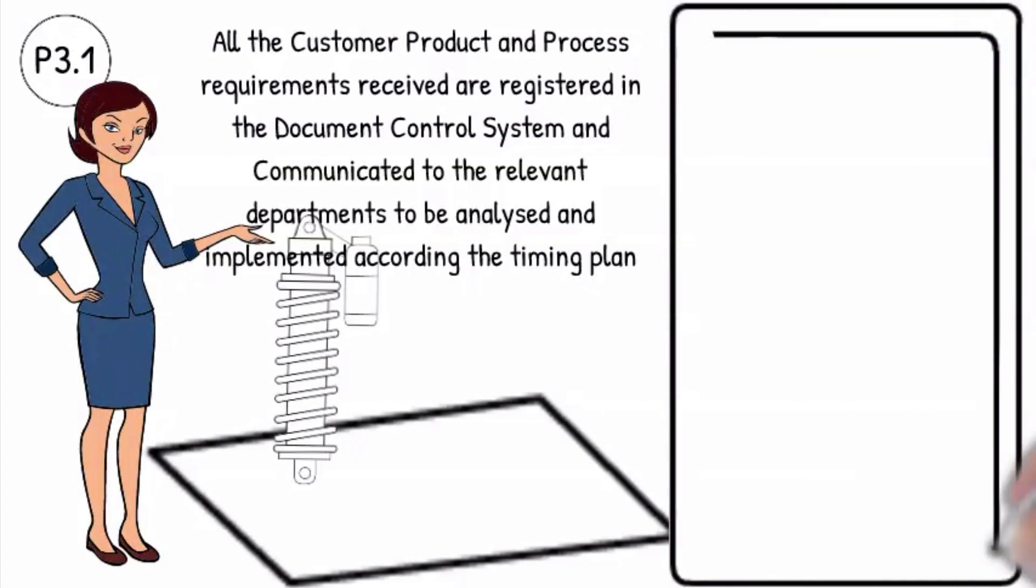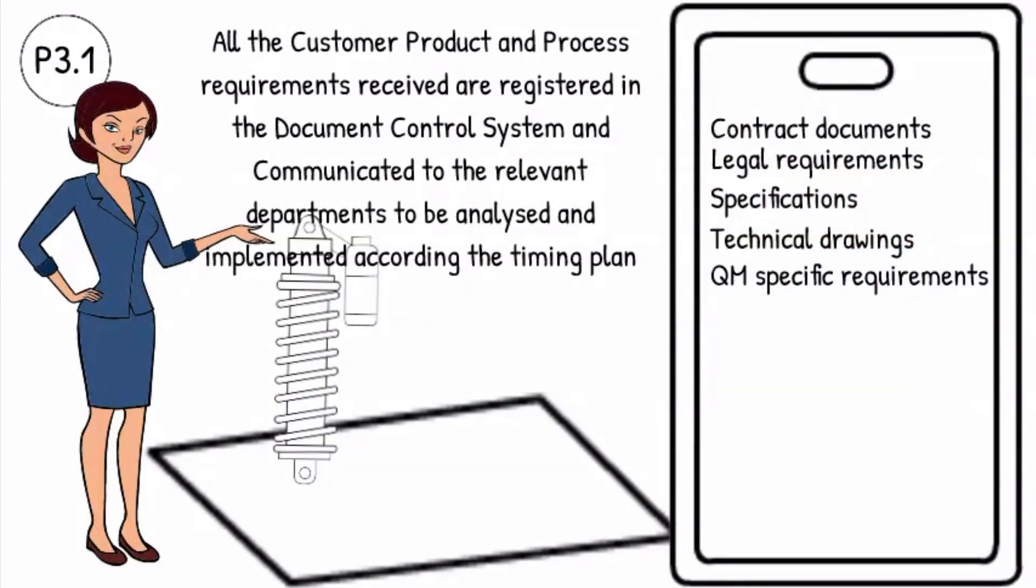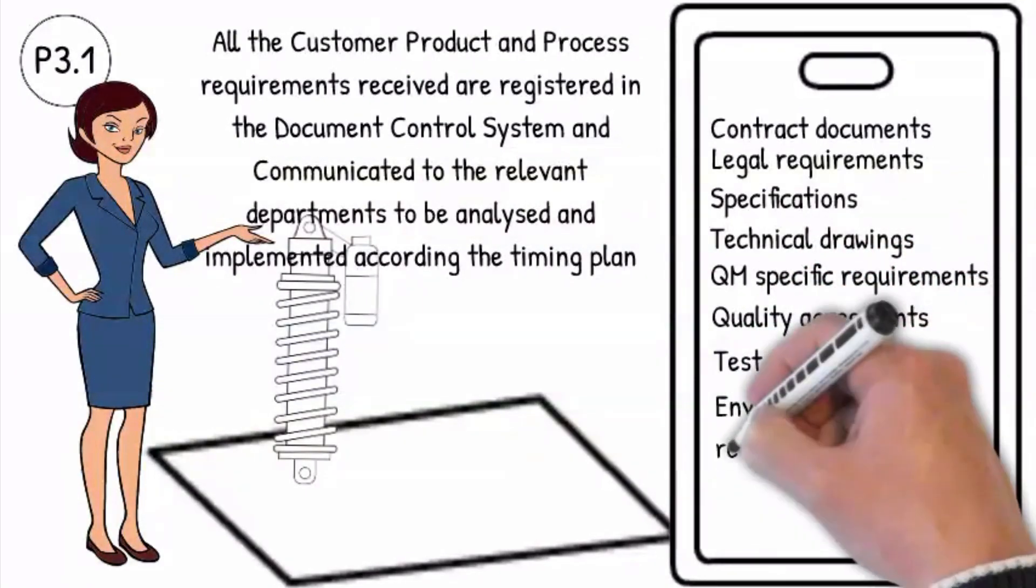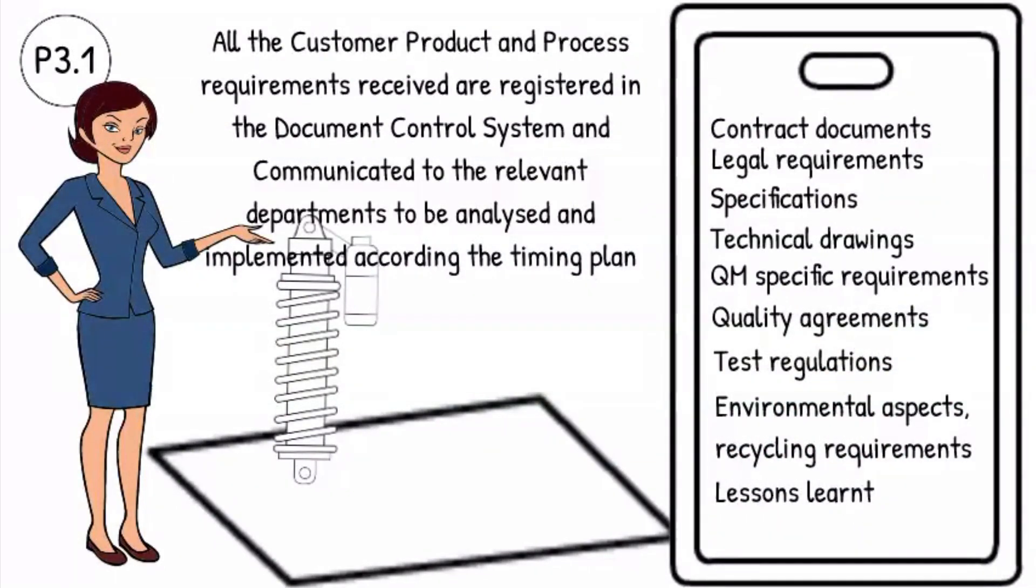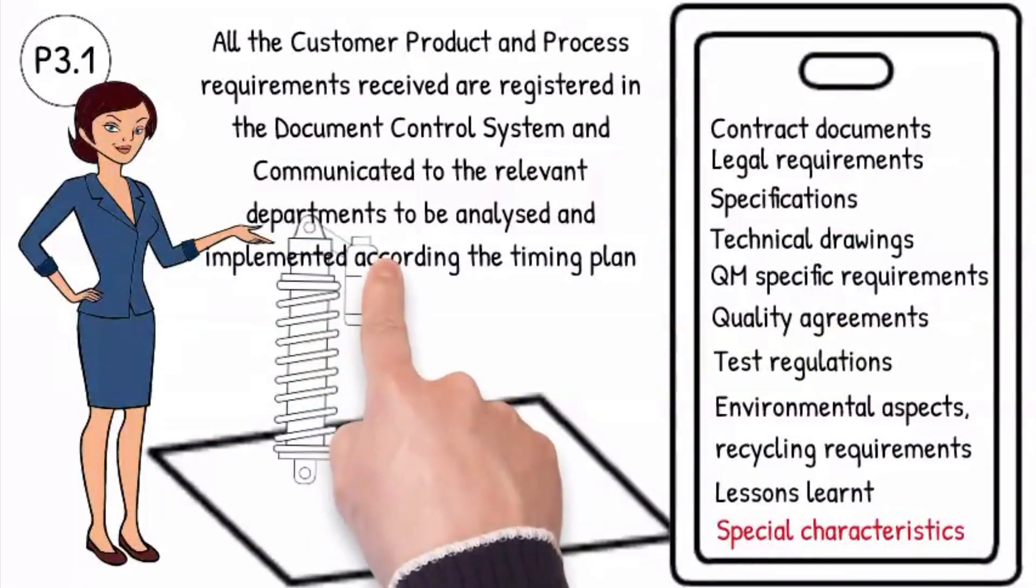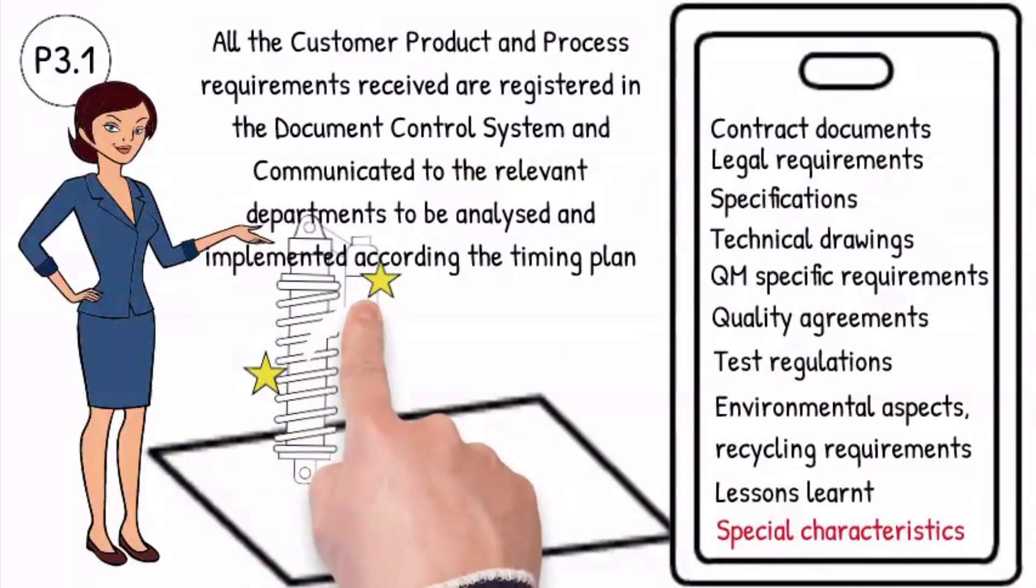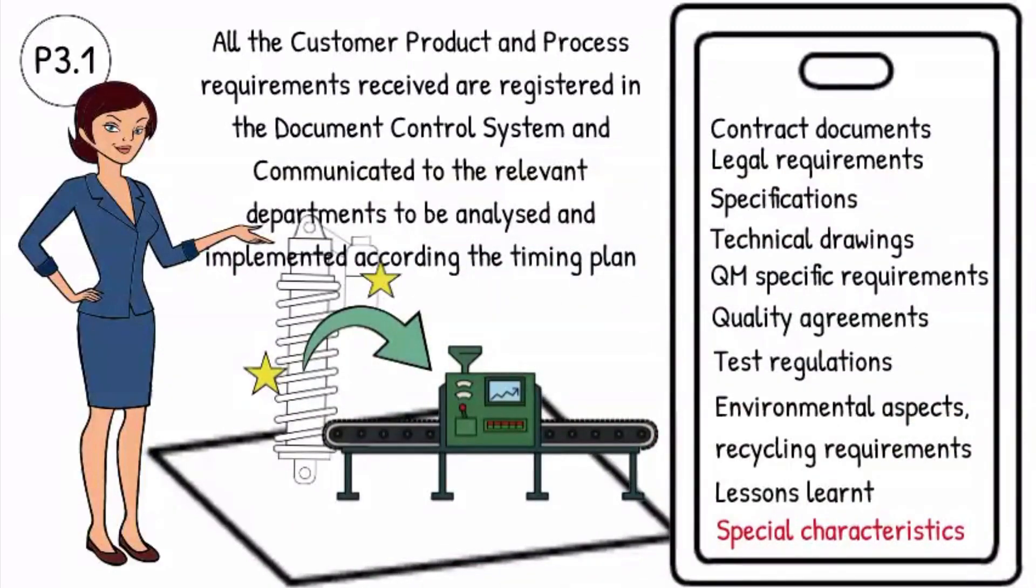And include the following: contract documents, legal requirements, specifications, technical drawings, quality specific requirements, quality agreements, test regulations, environmental aspects and recycling requirements, lessons learned from previous projects, special characteristics. The special characteristics will be identified on the basis of the customer requirements, legal requirements, manufacturing technology and characteristics that arise from the purpose and use of the product and the processes known from previous experience.